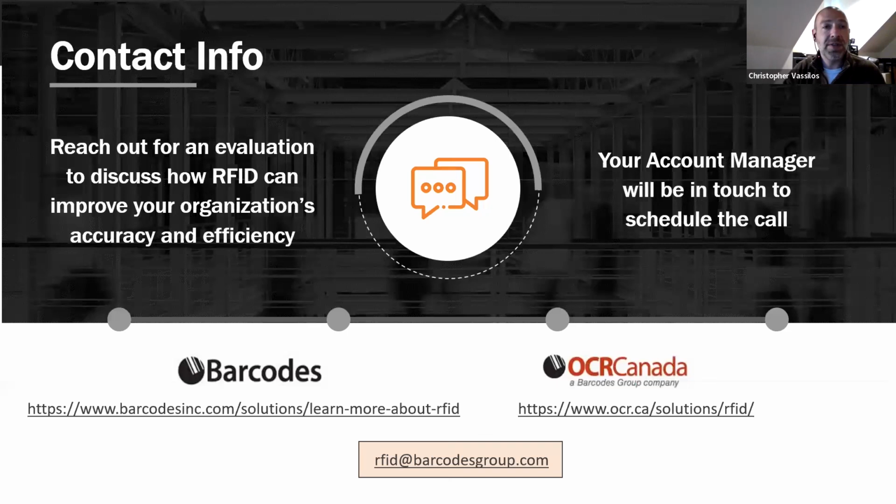What does that look like if you hire us? Again, it's worked out, but it usually involves we're bringing a variety of readers, as we scope to your particular project, on site. That could be multiple antennas, different readers, handheld readers, fixed readers, multiple tags, and engineers coming on site with their own gear. We're temporarily, over a day to a week period, putting up fixed read points. We're testing and documenting, and we're working hand in hand with our clients, with the project leaders. Oftentimes it's part of the statement of work. We're going to need forklift drivers, so your team is going to work with us.